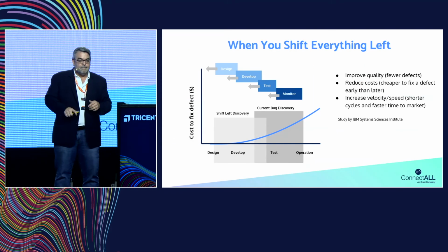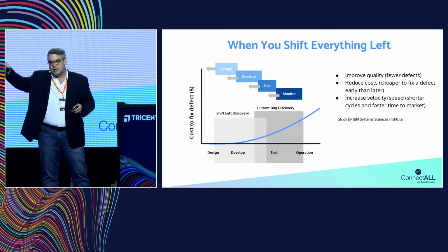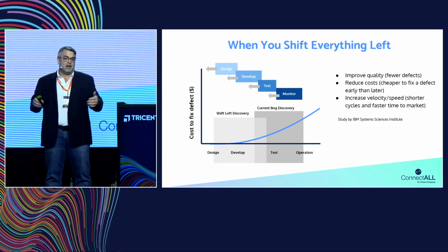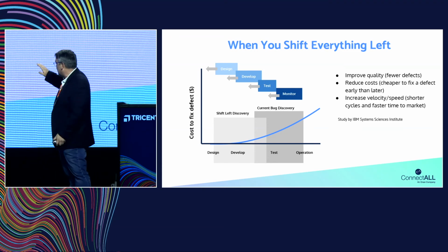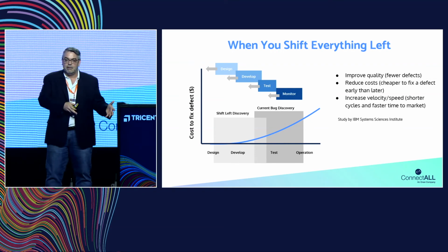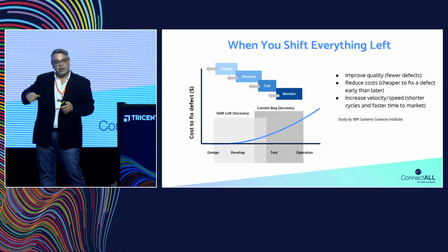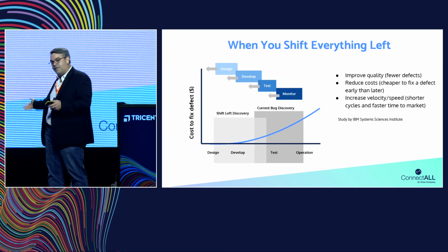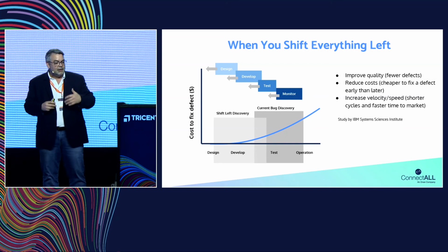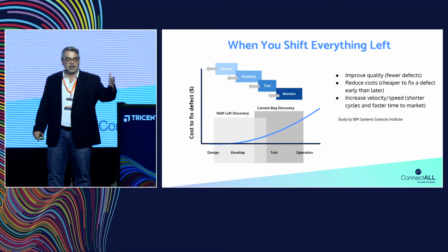We all know that the further a defect gets down the value stream process, from QA to monitor to code and production, the greater the cost is for repair. So by doing some basic shift left stuff we've heard, I was able to move left, having developers pair with quality experts to write the unit tests or the acceptance tests. We removed the meeting that stopped defects from coming right back by integrating the two solutions. We also realized that possibly the best thing to do is actually get acceptance tests written in design by the developers so they can be better formed.